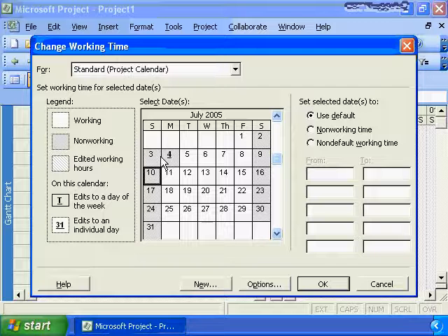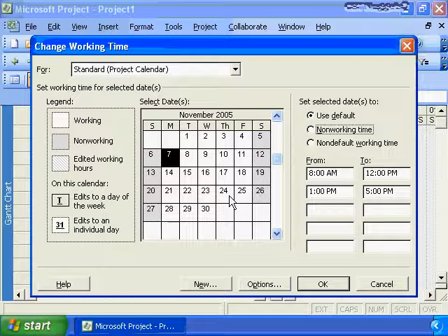Microsoft Project does not by default set any statutory holidays. So we will go on and find our next statutory holiday, Labor Day, and we will set it as a non-working day. And we would continue to do Thanksgiving Day and Christmas and New Year's Day and the appropriate holidays that your organization will observe. While you're setting holidays, I would encourage you to go in and set the holidays for several years in advance. You may be planning a project that's only 6 months long, so you feel you're safe going in and only setting the holidays for the next 6 months.